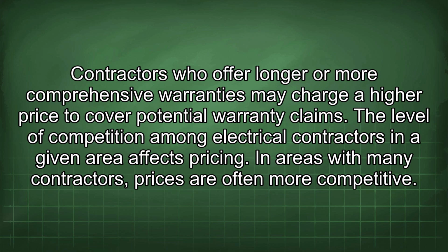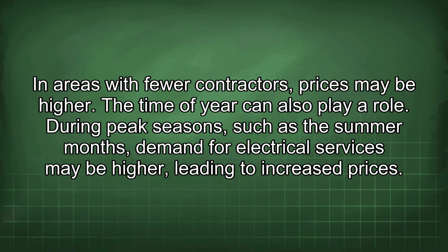The level of competition among electrical contractors in a given area affects pricing. In areas with many contractors, prices are often more competitive. In areas with fewer contractors, prices may be higher. The time of year can also play a role. During peak seasons, such as the summer months, demand for electrical services may be higher, leading to increased prices.